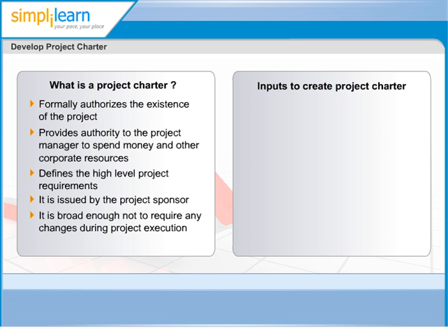Now, let's look at the key inputs to be considered in preparing the Project Charter. The first being the Project Statement of Work. This is created by project sponsor or the customer describing their needs, project scope, and how the project fits into their strategic goal. If the project is taken up under a contract, the request for proposal, i.e. RFP, can be considered as Project Statement of Work.